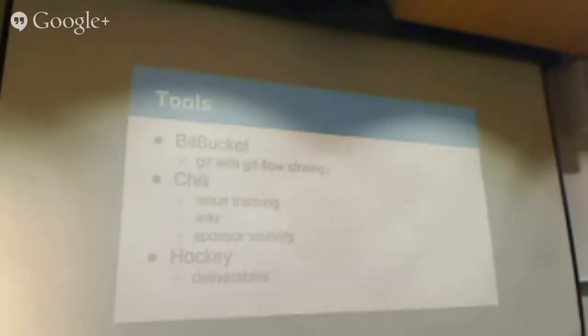And this is just another example. This is the current sprint. We just finished this, from the most recent deliverable we used today. So we pushed a couple of things ahead. As you can see, user story XX was on the previous sprint plan. We didn't fully complete it, so we had to complete it this sprint. It's not as many hours, since we re-estimated hours and everything.